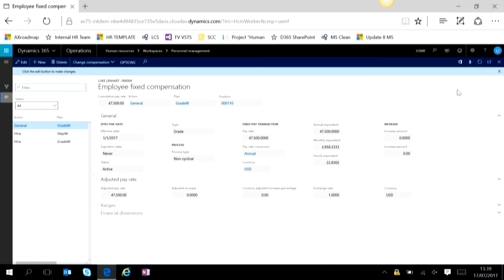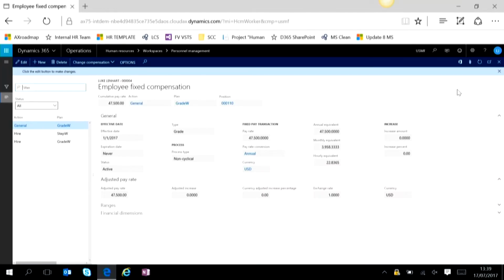And you can also put some rules in place to say whether you're allowed to go over that threshold. So it's called a soft, medium and hard threshold. A hard, you can't go over that maximum. A medium, it will warn you, it will say, look, you're only allowed 20,000 on this position. Are you sure you want to go 21,000? And there's a soft one where you can basically just go over the threshold without any warning.